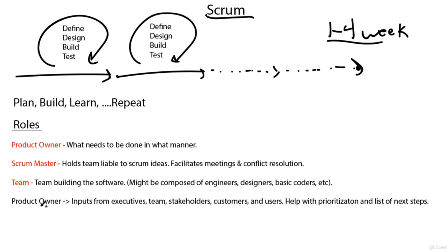So we need constant communication with the product owner. And this is a sort of disadvantage, because maybe we have a product owner that doesn't like to spend the time prioritizing what's next. They just want us to do everything. And if that's the case, the core tenets of Scrum fall apart, because we're supposed to be creating this flexible design that works with the product owner. If he or she steps out, we do not have that input, and we start developing in potentially wrong directions.